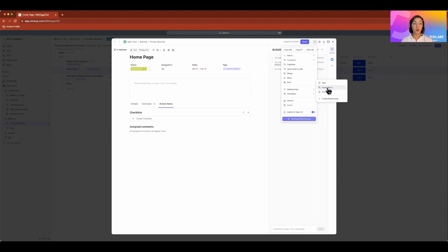I might just want a dependency to show that two items, one should be started before the other, but they could be worked on simultaneously. So ClickUp's dependencies and relationships are a lot more flexible than Jira's. Work isn't blocked just because there's a dependency. Maybe we just need to know that there's minimal slack time between two items, or two items are related, and that once work begins on one item, we can easily bring awareness to that work for the next item that needs to be addressed.